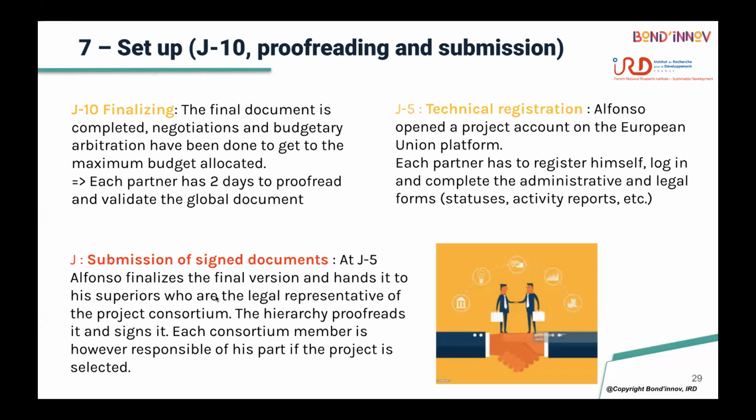So that's why I would advise, even if you continue working on the final documents, that it is better to submit a complete draft to your authorities to give them the time to look at the proposal before the deadline approaches.